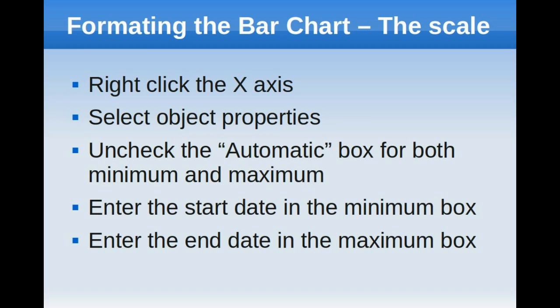The scale on which your Gantt chart is being shown is probably going to be a bit too wide, so what you want to do to fix that is right-click on the x-axis, then select object properties. Uncheck the automatic box for the minimum and the maximum values, and then enter in a start date that's close enough to the start of the first task, and an end date which is close enough to the end of the last task, and the scale will be a lot more appropriate.